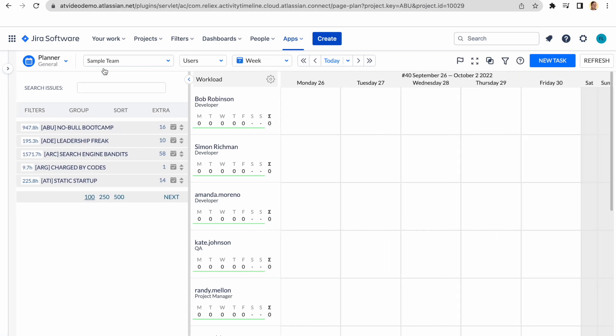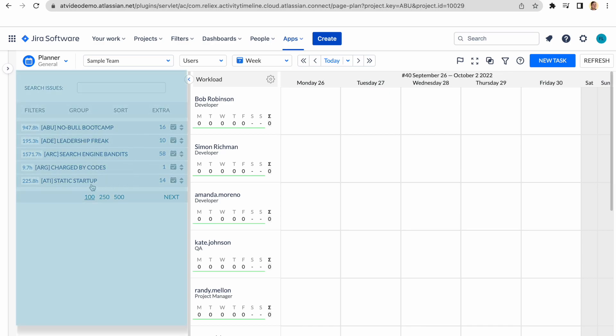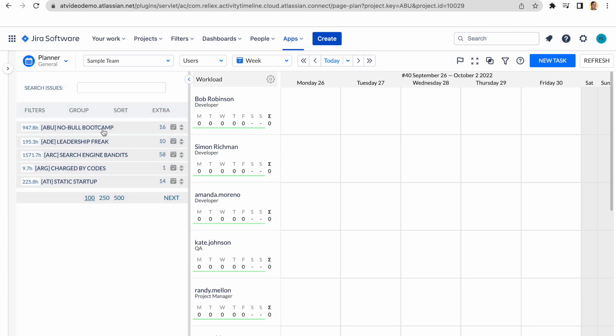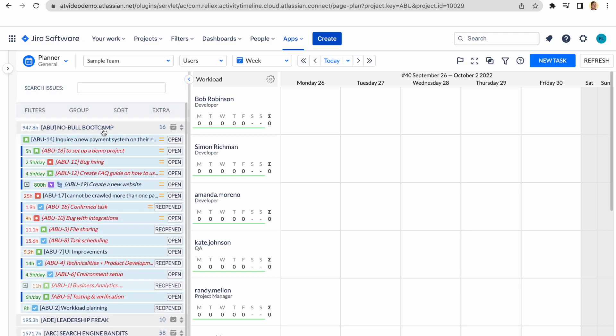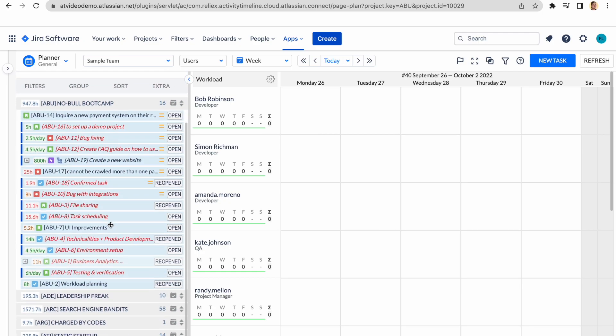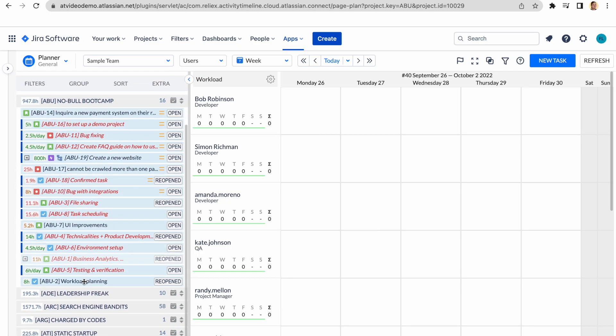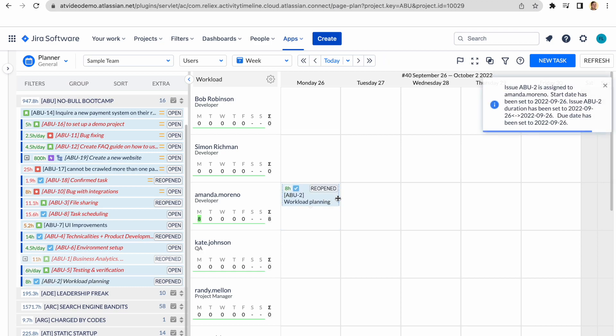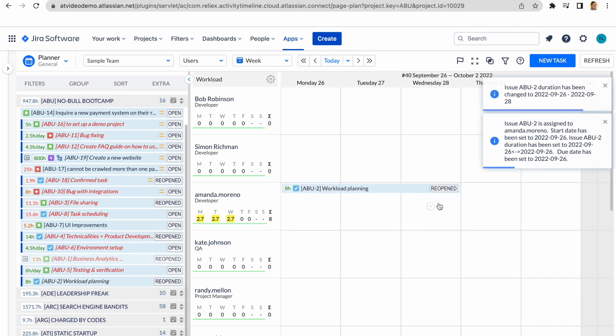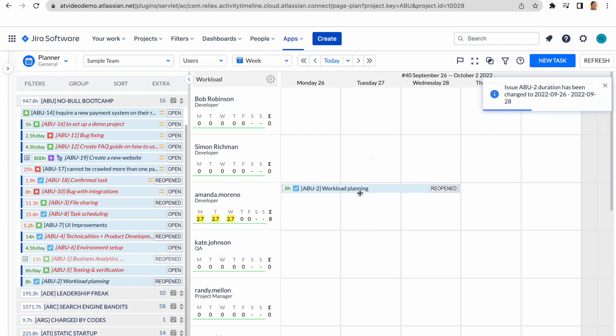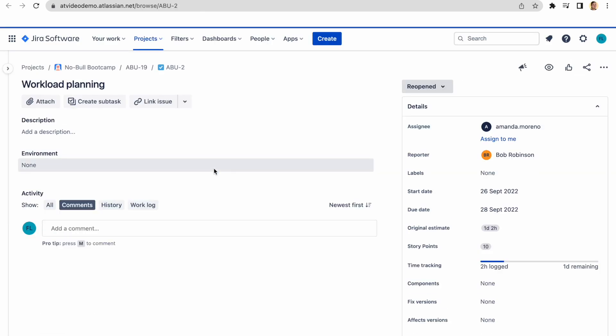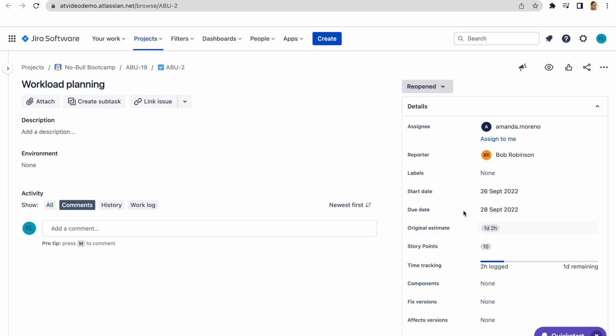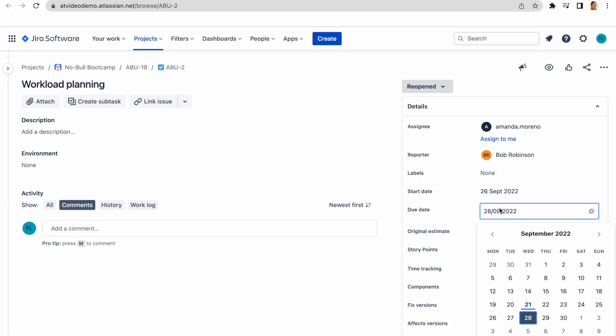Here on the right you can see your Jira users and their schedules, so you see who is doing what and when it's going to be done. On the left side you can see the backlog of tasks coming from your Jira. Tasks can appear in the calendar in two different ways, but the easiest way is to simply grab the task from the left panel and drop it on the timeline. In this way the task will be scheduled both here and in Jira. As you can see, the task was also updated in Jira.